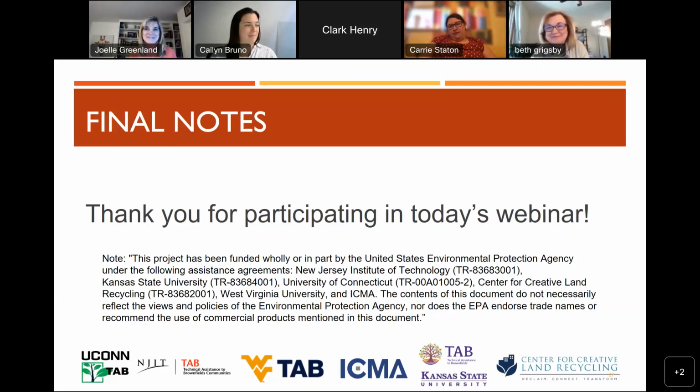We didn't really talk about the grants.gov part of it all, but grants.gov is where you'll be applying, and it will be down for regularly scheduled maintenance the weekend before the deadline. You may have noticed that the deadline is 2 days before a holiday. You typically get a confirmation within 48 hours, but there will be a holiday mixed in there if you apply on the deadline date. So keep all of these things in mind when you're planning your schedule for application.